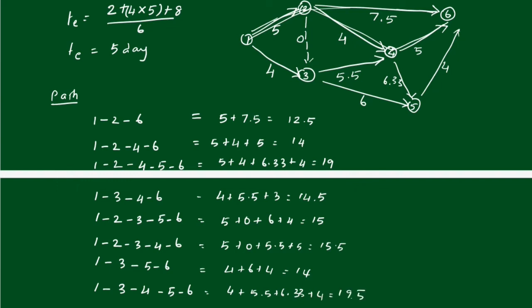The path with the maximum duration is the critical path, and that duration is the project completion time. The maximum duration is 19.5 days, so the critical path is 1-3-4-5-6, and the project completion duration is 19.5 days. We can draw the critical path as a double line: 1-3-4-5-6.